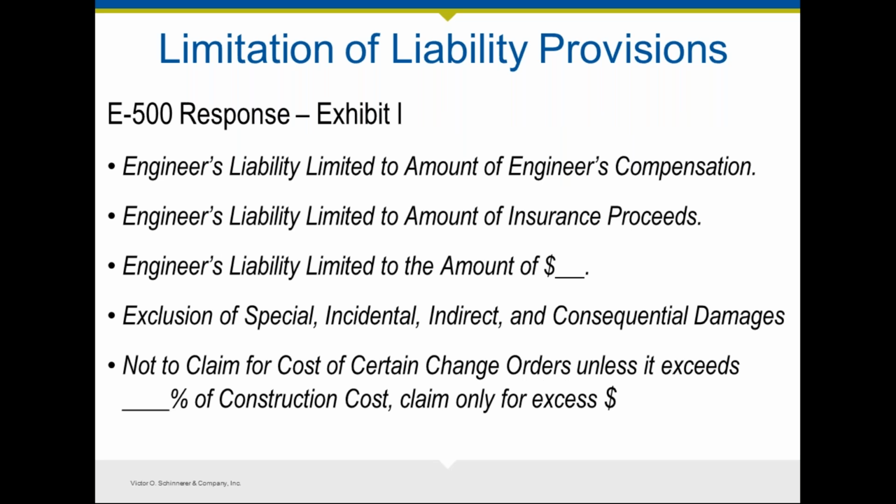E500 has by far, in my opinion, the most comprehensive response to this, where you can limit your liability to the amount of the engineer's compensation, amount of available insurance proceeds. One thing that I like to see in an agreement is the exclusion of special, incidental, indirect, and consequential damages. Clients oftentimes are willing to accept those. So that could be an excellent way to limit your liability that the clients oftentimes accept, because there's a recognition that